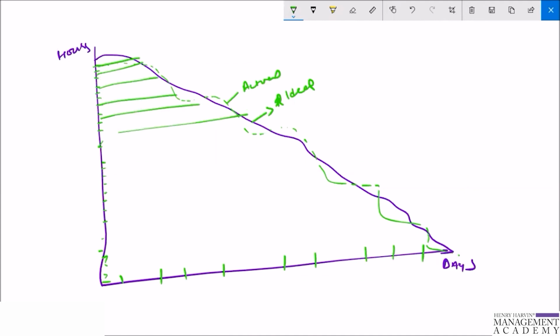So the benefit of displaying time is that it provides a more granular view of the progress, but it leads to micromanagement as well. So it is typically suggested for a new agile team, and teams are often asked to carefully track time spent and remaining hours. But all those who ask their team to do so understand that the team is hired to develop a real product, not to spend an amount of time. Therefore, most agile teams track the remaining size of the product.